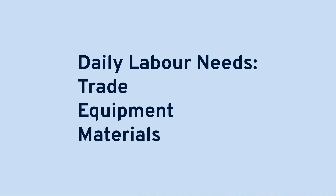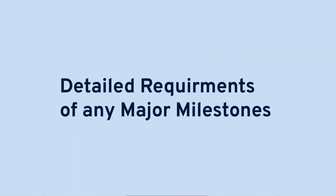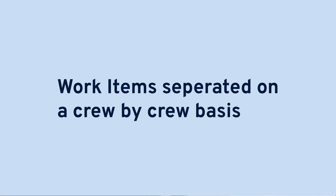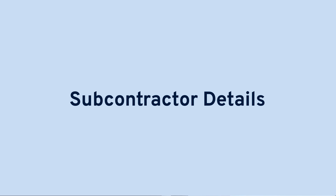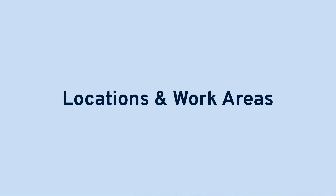When it comes to building a look-ahead, there are a few popular things that are normally included. Consider things like daily labour needs separated by trade, equipment and materials needed on a particular day, detailed requirements of major milestones, work items separated on a crew-by-crew basis, material deliveries, and subcontractor details, locations, and work areas. These are just a few of the most common choices, and in reality your look-ahead could include a whole lot more. If you're managing your look-ahead plans with Aphex, then all of this is a lot easier to stay on top of than it might sound.